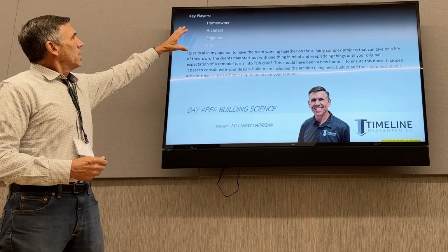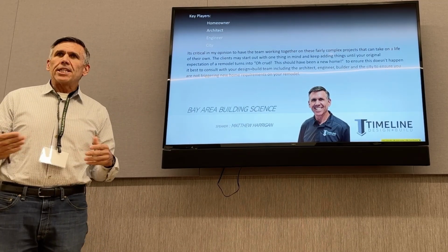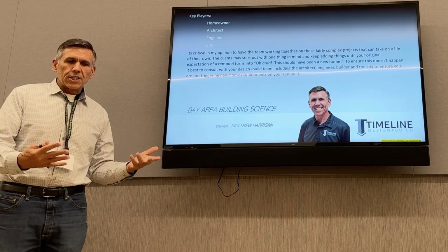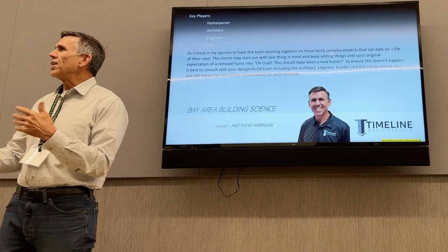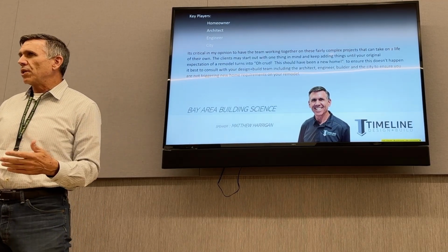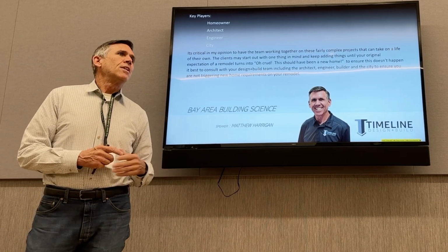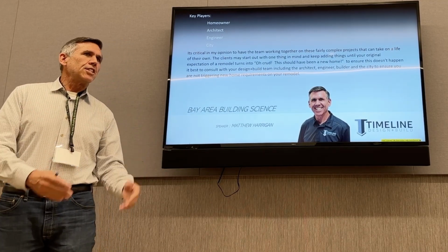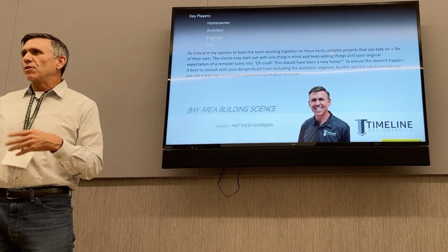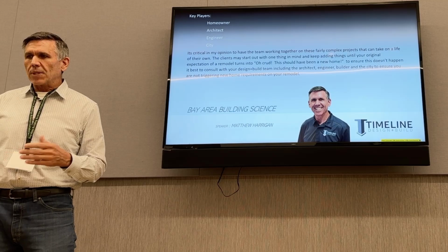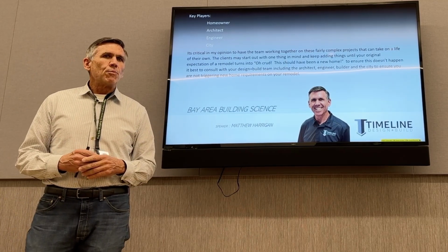So again, the key players: homeowner, architect, engineer, and the city. When we're designing these projects, we've got to have everybody on board. When they're on the bubble, should it be a remodel or a rebuild? In some jurisdictions, the city is going to say, hey, you're over 50%, this is a new house. This is going to be all new PG&E, all new everything. That's going to trigger certain things, and the clients don't always understand these things. So this is something we have to be aware of.